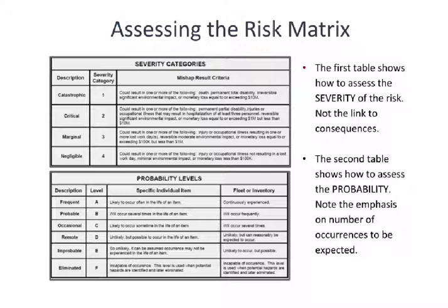Now that one we need to kind of talk about a little bit. Remember that this is being used on military standard projects, and so something like a weapon system or a military base or a military installation or a communication system runs into the millions of dollars. So therefore, from their perspective, a loss of less than $100,000 is not considered large.